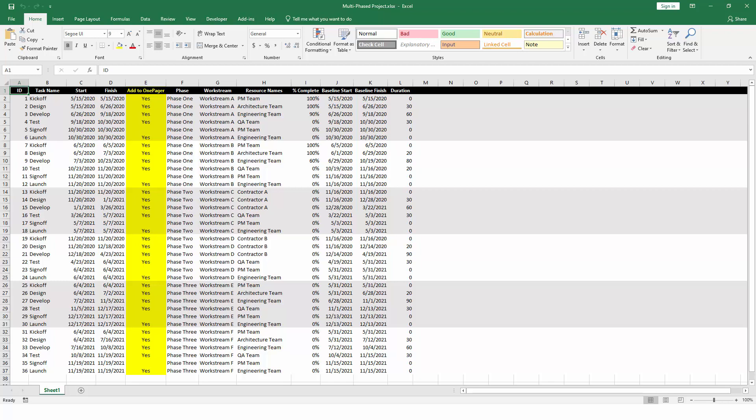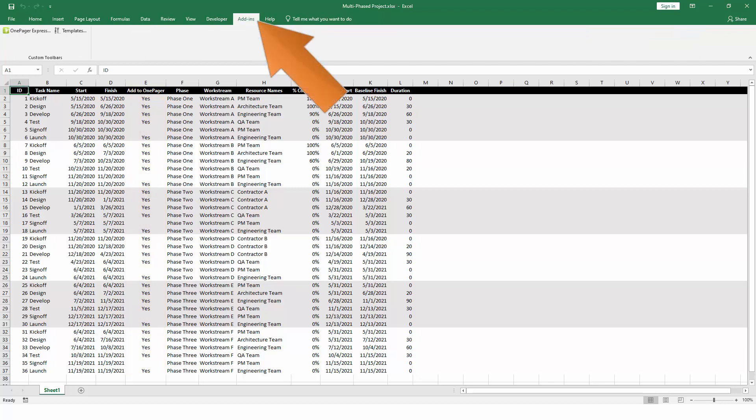If you do use a filter field, OnePager will import everything with a yes in that field. If you don't want to import something, just leave it blank. With your task selected, go to the Add-ins tab of Excel and click the OnePager Express button.